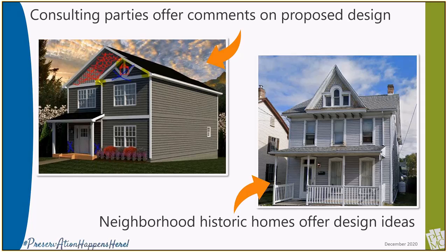The developer noted that losing that stone feature would be a cost savings to invest elsewhere in the design of the building. The SHPO staff also suggested alternative treatments for the area under the gables, perhaps a decorative window or fish scale shingles as seen elsewhere in the historic district. At the end of the consultation, agreement was reached on the design of the infill construction, and the drafting of an agreement to resolve the adverse effect could begin.